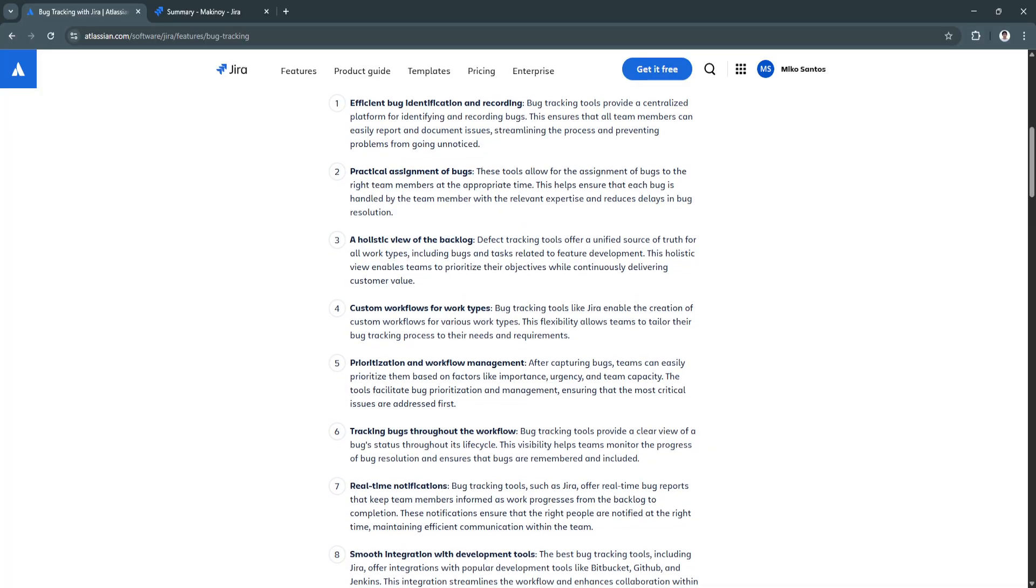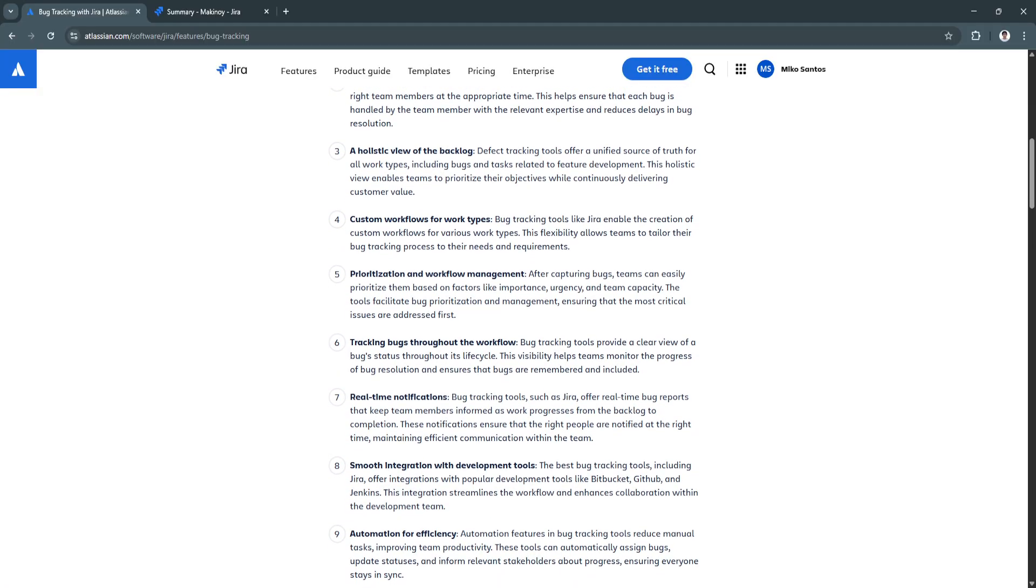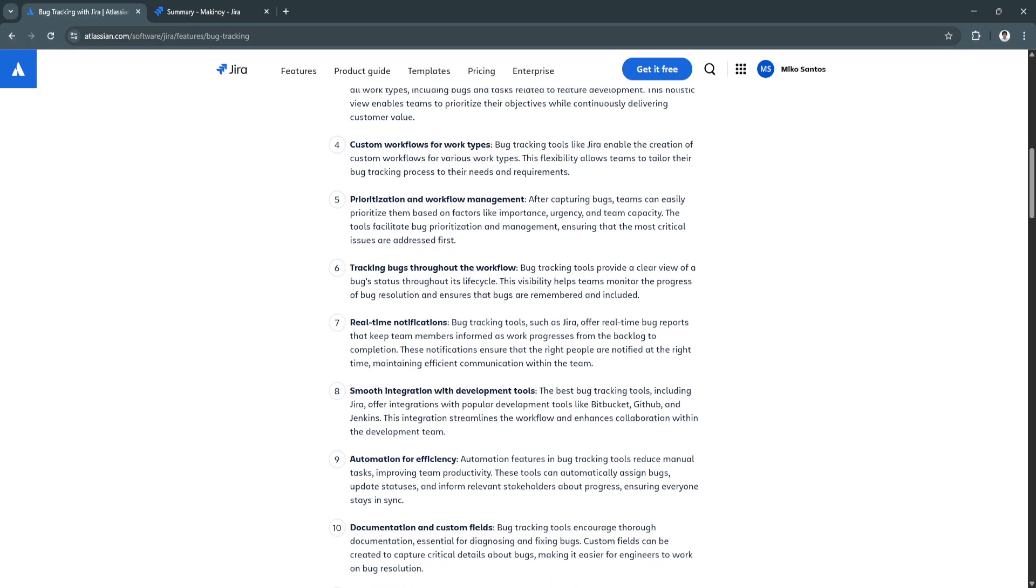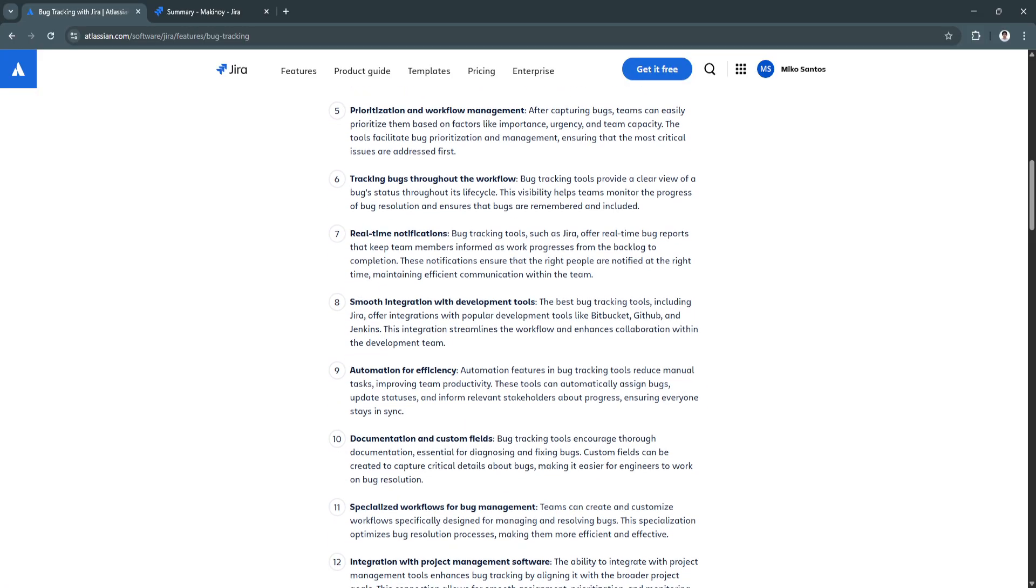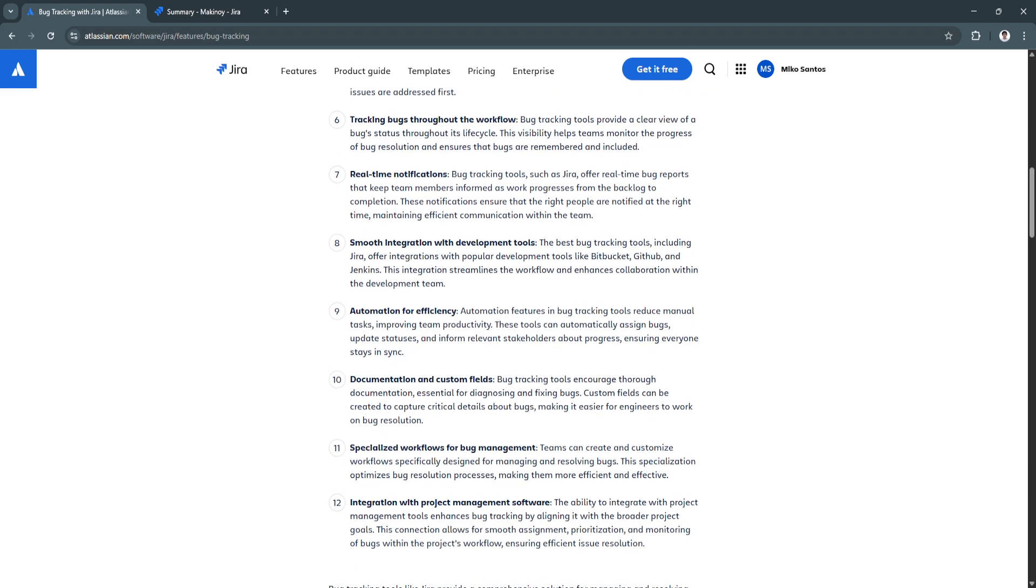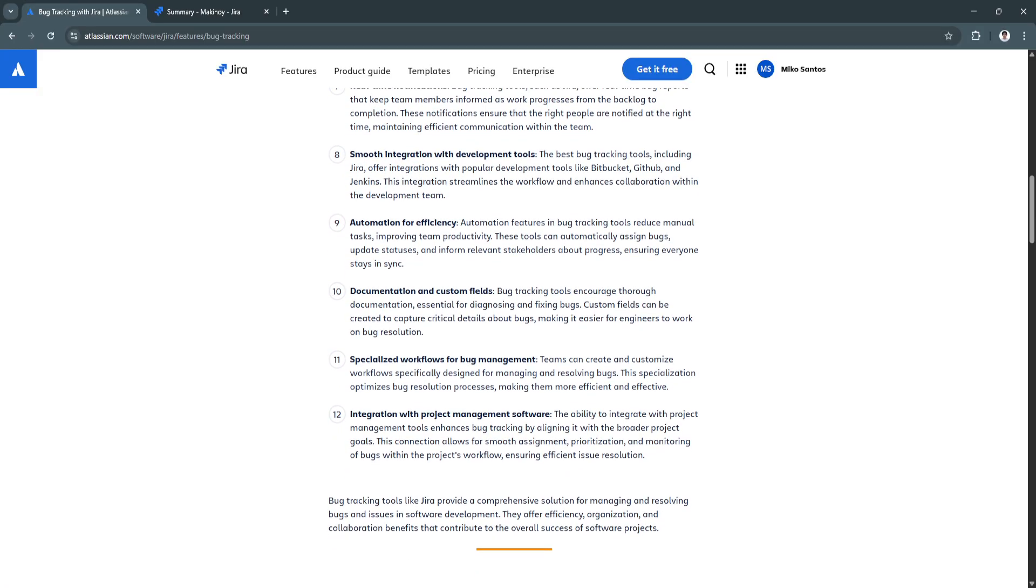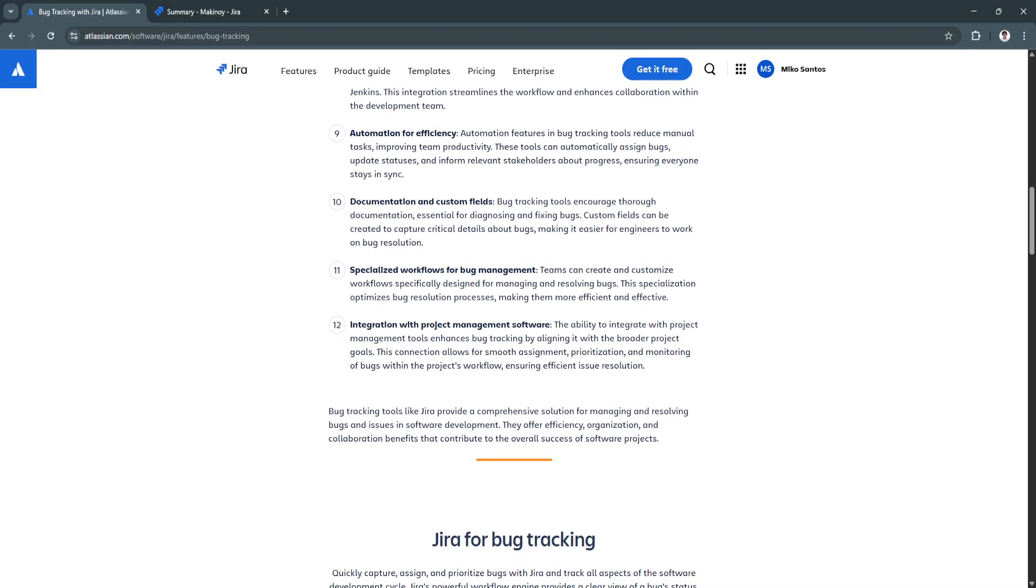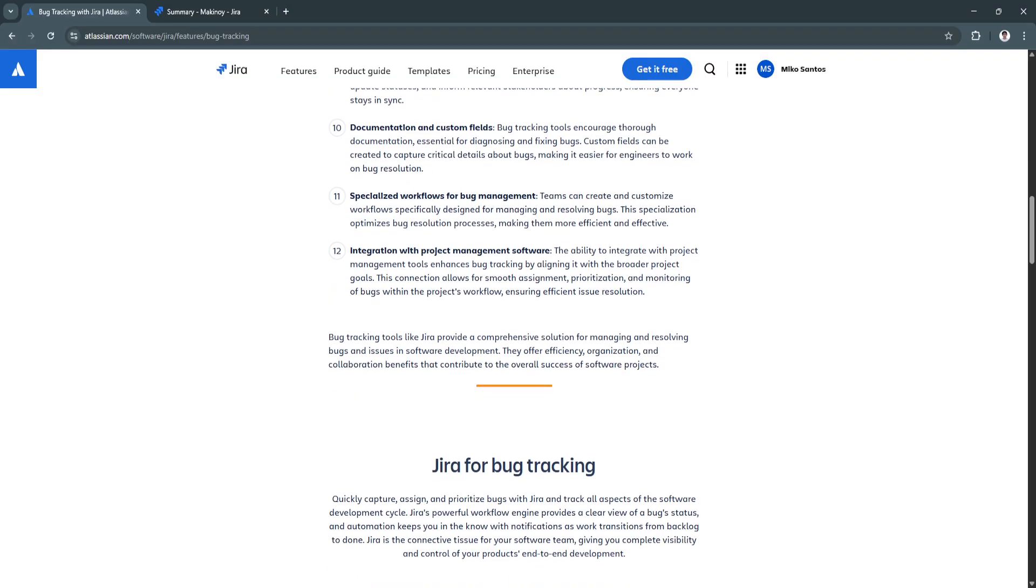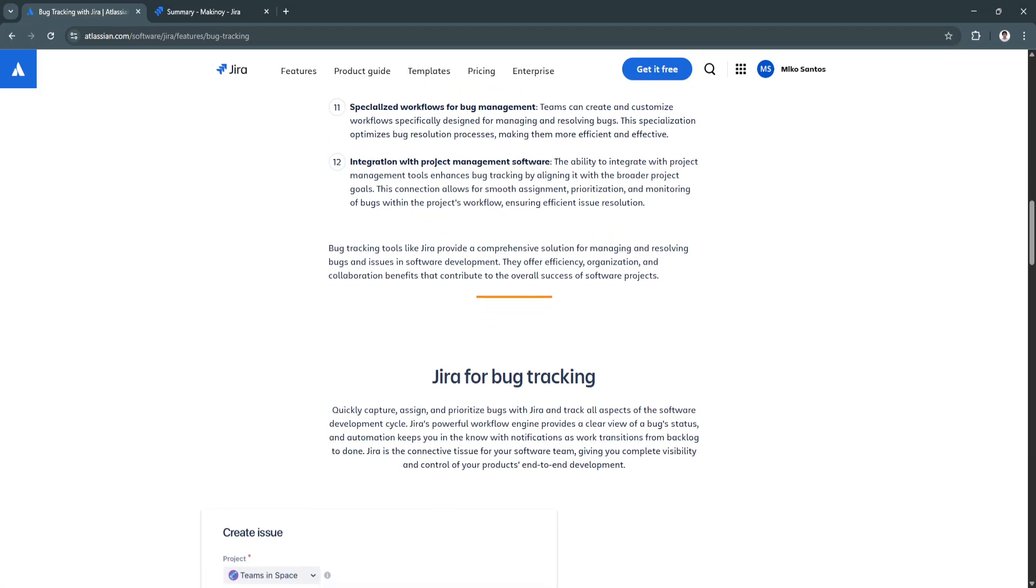When used for tracking bugs, Jira allows teams to document detailed information about each issue, such as the title, a full description, steps to reproduce, screenshots, severity level, and more. Bugs can be assigned to specific team members, categorized, prioritized, and linked to related tasks or user stories. As bugs move through the development lifecycle, their status updates can be tracked in real time, typically flowing through states like open, in progress, in review, and resolved.